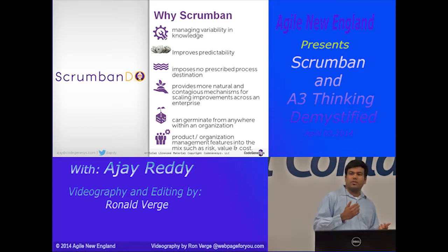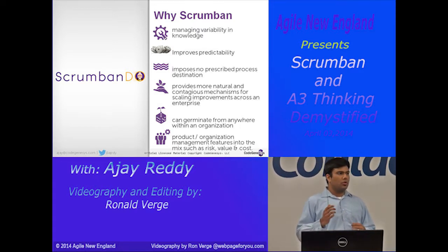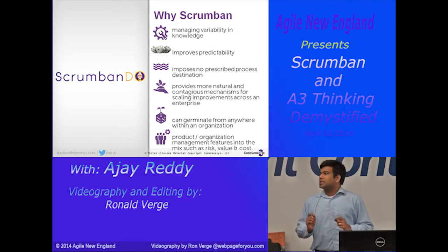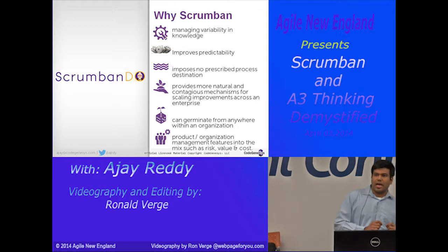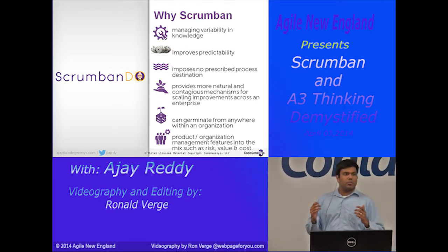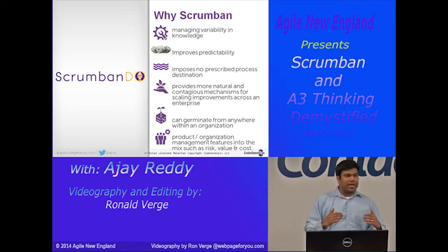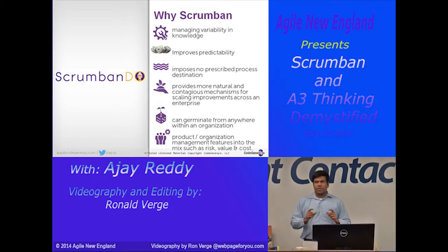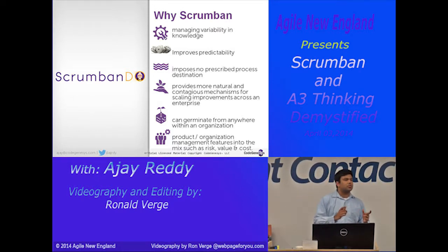Now, any of you theory of constraints folks, TOC? For TOC to be successful, there's a very important thing that needs to happen. TOC has to come top down. If you read the book, The Goal, there was buy-in from the top down. For Kanban to be successful, it doesn't make any such requirement from those who implement it. And because of that top-down, middle-out, or bottom-up approach, it gives sustainability that much more of an edge.